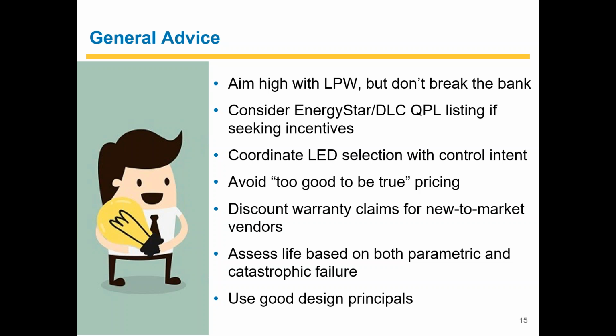So when I say catastrophic failure, if we're going to have a lot of lamp switching, generally speaking, the lamps are not going to last as long, even if they are listed with 50,000 or 100,000 hour product lives. The LRC did some really interesting study on retrofit lamps, and they basically found that the on-off cycling of inexpensive drivers causes the solder points for the individual electronic components inside the product to weaken over time due to thermal stress, causing an eventual catastrophic failure. They did this with a whole bunch of, I think, A-line retrofit lamps like you might get at a big box retailer, and they found that the catastrophic failure rate was around 10,000 hours of rapid switching that you might experience in, say, a service closet or a restroom, versus the listed 25,000 to 50,000 hour product lives.